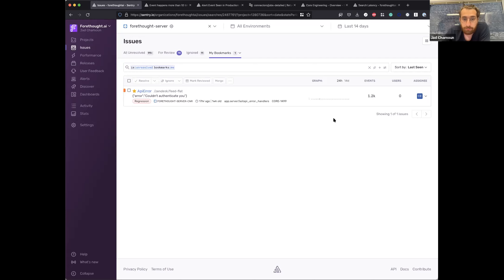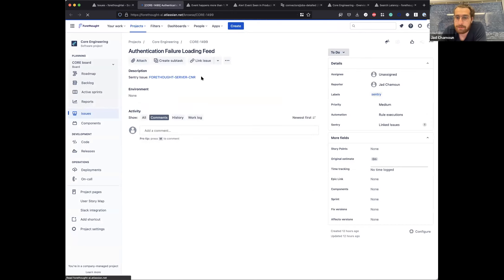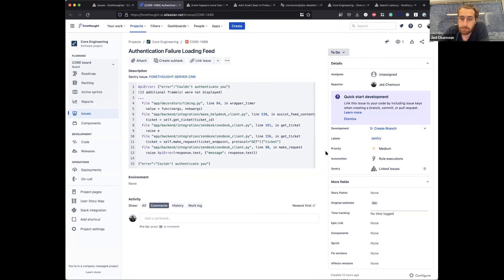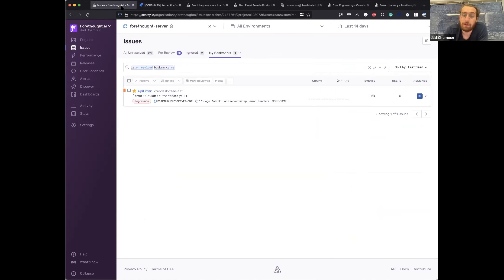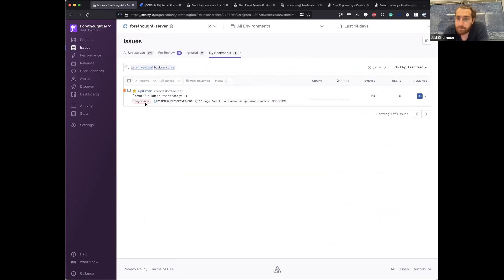Looking into this issue, what's handy is that I can see there's already a Jira issue open for it. From here I can go into that Jira issue and see its status — what's going on, and whether it's already in a sprint. If not, I know I need to check with the team to make sure it goes into an upcoming sprint.